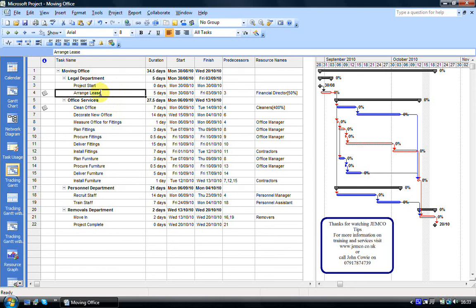If we look over in the Gantt chart area over here, you can now see that indeed that's where the links are being carried out also. There's not a thing on the plan that doesn't have a link at the lower level. And if we look in the predecessors column, of course it's backed up by that, none of the summary items have got any links within them, nor between them, nor to lower levels. And that's very important, so that one item of link doesn't override a link at a lower level within the plan.